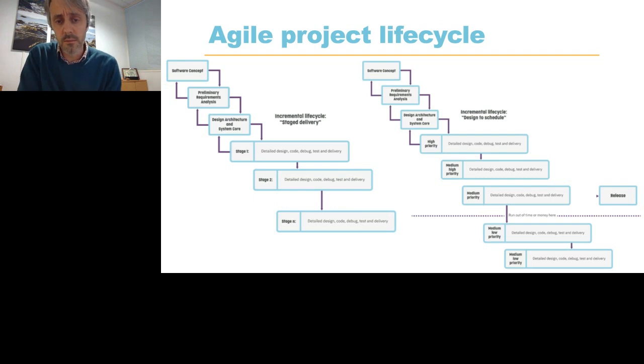So this is where the second one, the one on the right here, comes in. In this life cycle, we're a bit more agile. So it looks like we've got a backlog here, and we're prioritizing user stories. So we're getting the highest value user stories in early, and we're maybe even evolving or adjusting that backlog as we learn, as we go along.